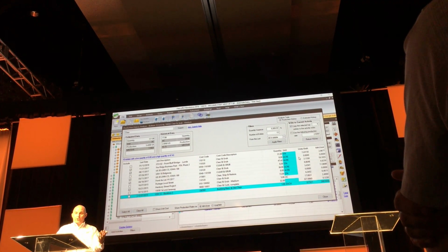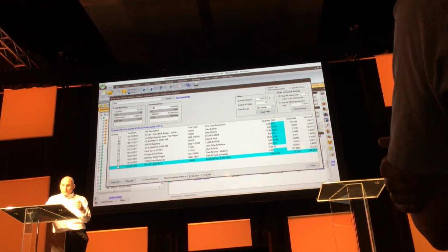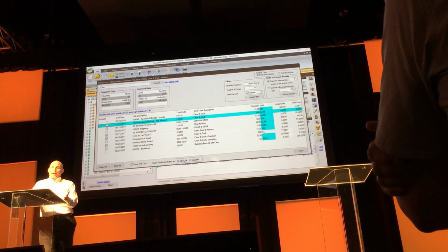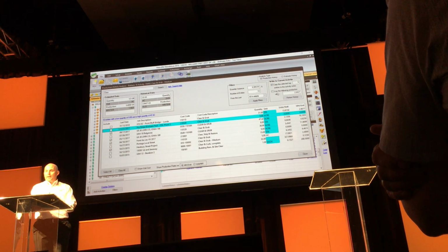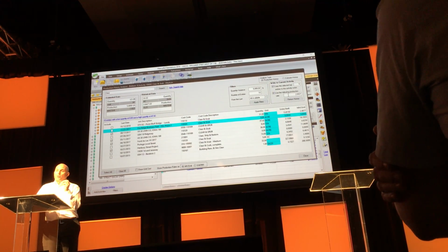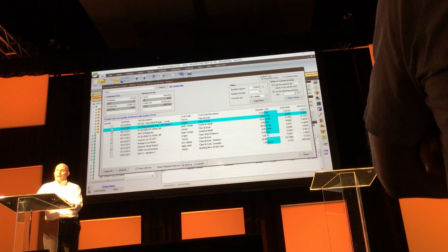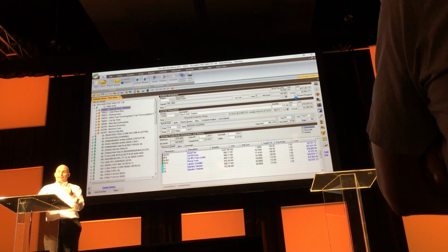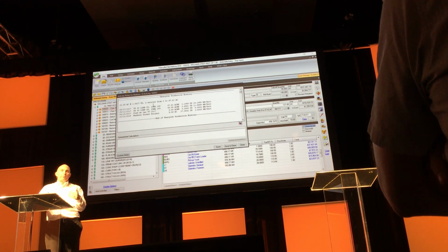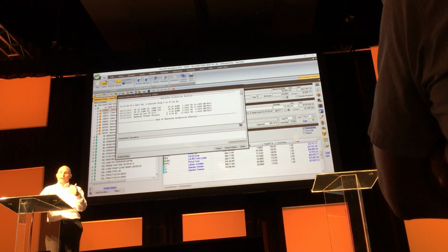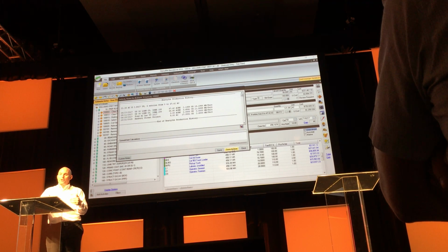I see the averages on the top of the screen. And then I've got on the right-hand side of the screen an area that says use the following production rate. And if I check that checkbox and hit the return history button, what that's going to do is set my activity production to that rate, and it's going to put in the notes the jobs that I've used as comparison jobs to reinforce that I can hit that production.